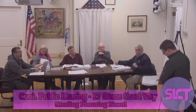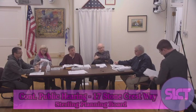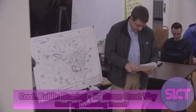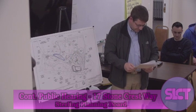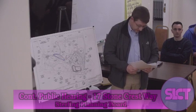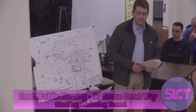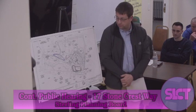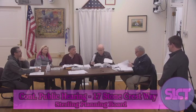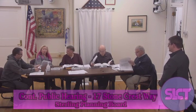And I do want to say that the board had some comments at our February 20th meeting, which we had addressed. We clarified snow storage locations on the plans, a nice bold and heavy hatch. We called out in detail the proposed septic tank and pump station, as well as the proposed industrial wastewater holding tank adjacent to the building. And we showed both the Mass DEP Zone 2 line and the Town of Sterling groundwater protection overlay district line. So to get rid of all confusion, we're showing all those pertinent groundwater lines. I saw the detail for the tank for the floor drain. It's all there that we asked for. I don't have any questions.